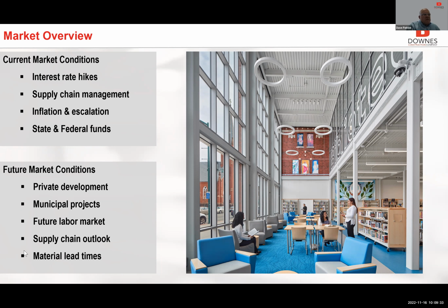And coupled with that, there was a tremendous amount of product that was being imported, generally speaking, coming in through the coast of California. And most of you may remember that at one point, I think we had 400 container ships off the coast of California that were unable to get to the port, also because of a labor shortage, and we could not unload that product. Now, meanwhile, while that was going on and that disruption happened in the manufacturing sector, back here in New England, with the exception, I think, of Boston, the construction industry was deemed an essential business. So we were continuing to put construction in place. We were continuing to put all of the manufactured products, the equipment, the materials, we were putting that in place. But meanwhile, the backlog of the manufacturing side of our business really took a hit and caused a delay.